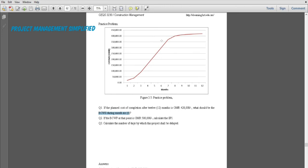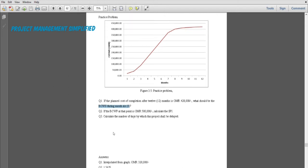At the six-month mark, we draw a line from there and it will intersect with the curve. From the money axis we can get something like 320,000 Romani reals that we have spent so far, because this is expenditure against time. The question asks for the baseline cost of work scheduled — that is, the planned cost against time — and we can get it directly from the graph.